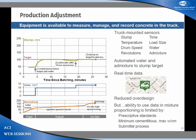However, there are limits to using this technology. Prescriptive standards impose minimum cement content and maximum cementitious material limits that prevent reducing cement even when the capability exists. The submittal process requires locking in a mix design with only limited changes allowed. Having the technology to make common sense, well-justified mix design changes means we need to rethink the submittal process when data and capability exist to properly justify those changes.